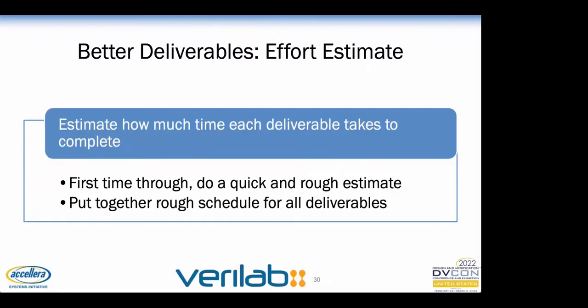We aren't looking for down-to-the-minute estimations at this point, and for larger projects, we may want to just stick with task granularity of a week. Avoid the temptation to start doing architectural or test bench design work at this stage. If there are big decisions to be made before pieces of work can be done, include time to make that decision in the effort estimate.